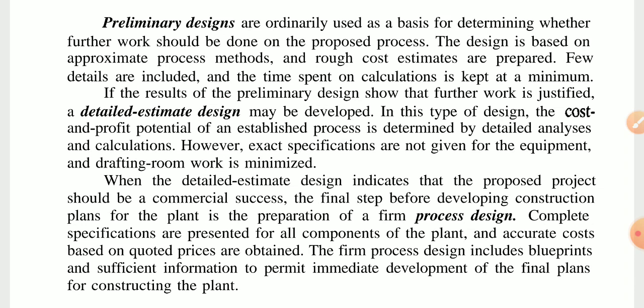The preliminary or quick estimate design is ordinarily used as a basis for determining whether further work should be done on the proposed process. The design is based on approximate process methods and rough cost estimates are prepared. Few details are included and the time spent on calculations is kept to a minimum.